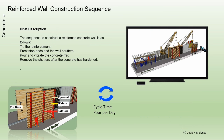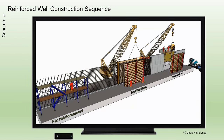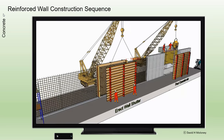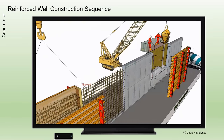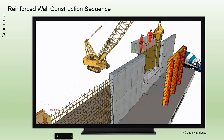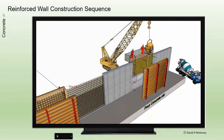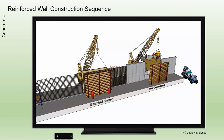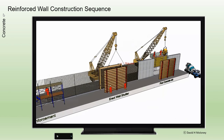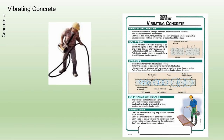Concrete wall construction. The sequence to construct a reinforced concrete wall is as follows: tie the reinforcement; erect stop ends and the wall shutters; pour and vibrate the concrete mix; remove the shutters after the concrete has hardened. Vibrators are used to compact the concrete.